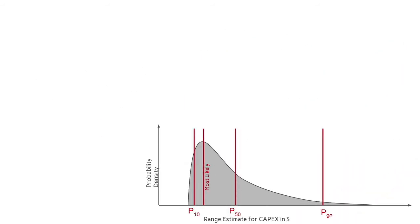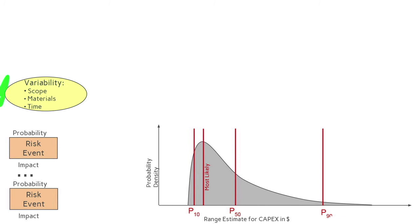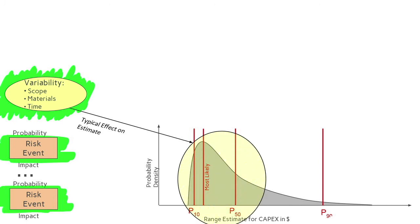Ultimately, the shape of the uncertainty range estimate is a function of both variability and risk events, where variability tends to define the size of the central body, and risk events determine the size of the tail.